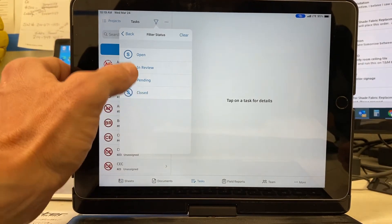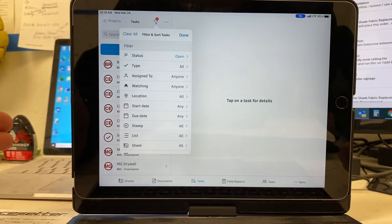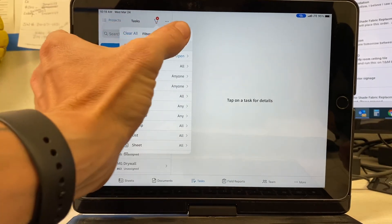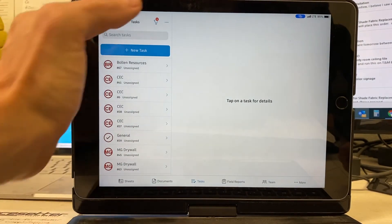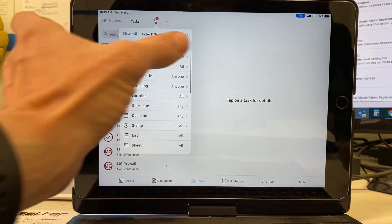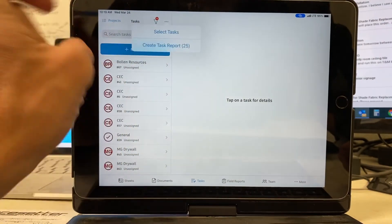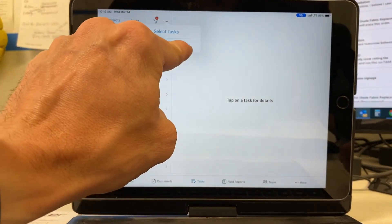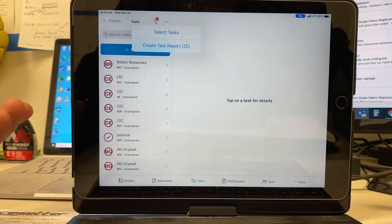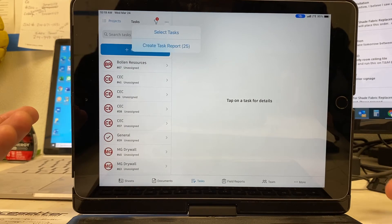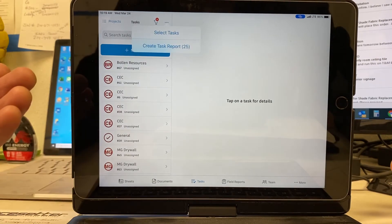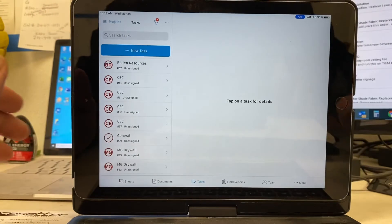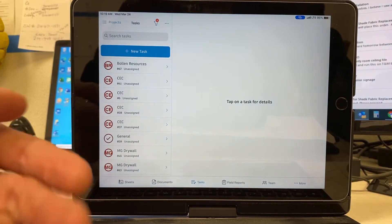So right now, I want only open items. Status open, right? Now all of my closed items are gone. I can go back to create task report. I went from 64 down to 25. I have 25 items that are still remaining on my punch list that I need to get done. So now I need to remind my subs about it.